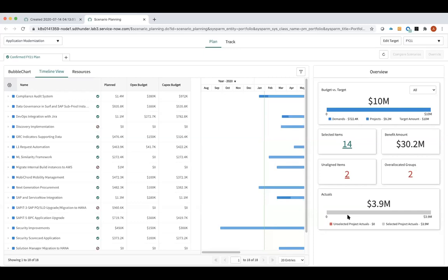So let's say I had a project that I budgeted $800,000 for. Now my funds have been cut short, so I want to uncheck that project. I want to pull the plug on working on that. So technically, that may free up $800,000 in my budget, but it's kind of like one of those not so fast situations because I may have already spent $300,000 out of $800,000. So just because I'm pulling that $800,000 out of my budget doesn't mean that I'm going to get all of it back.